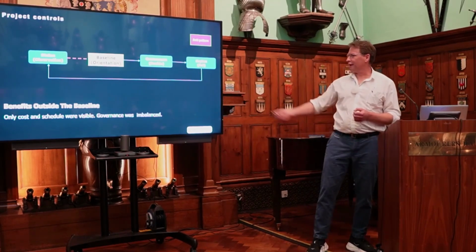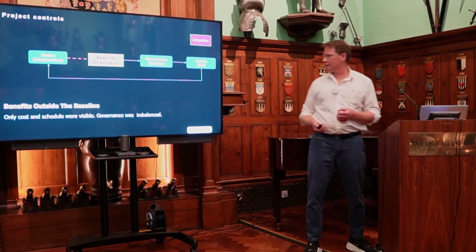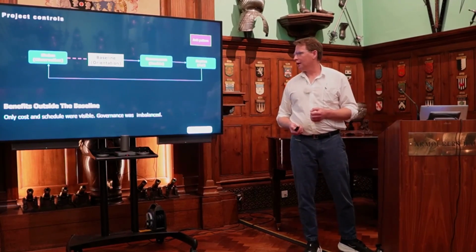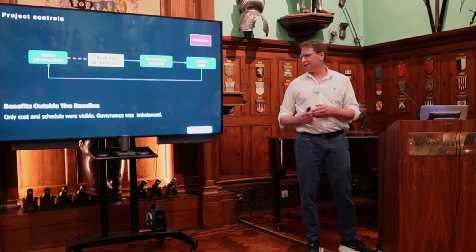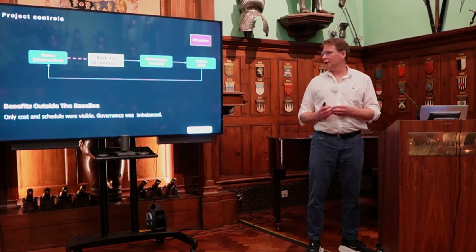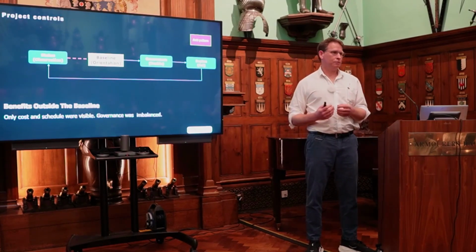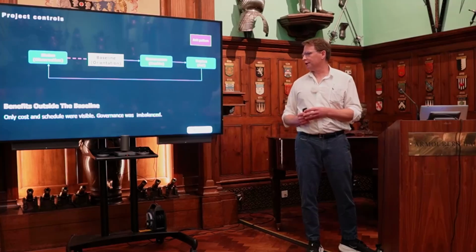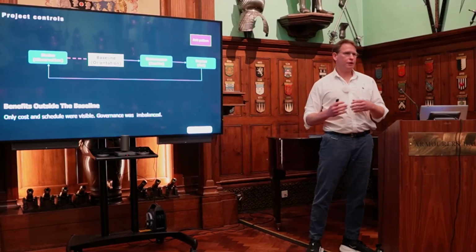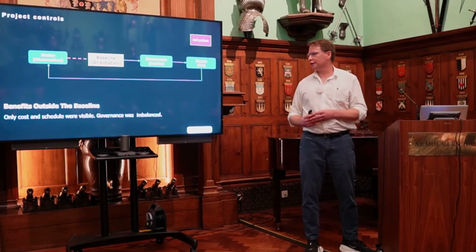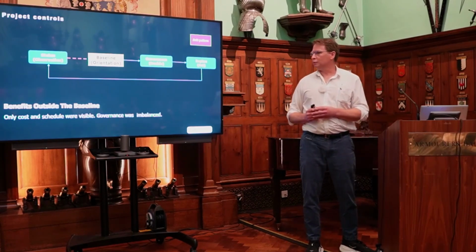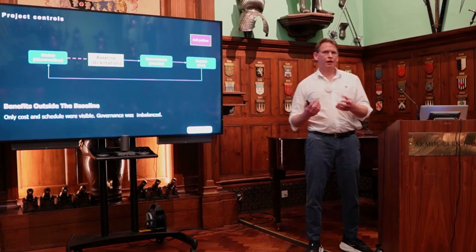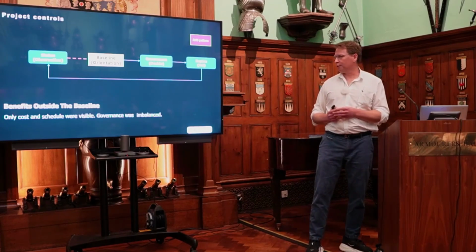So, aviation, UK major airline. So again, orientation. On this one, the baseline was very good, also very clear. Cost and schedule and risk well represented within that. But benefits, even though there were large programs, there weren't just projects, obviously, there were large programs. So the benefits of those programs were not included in that baseline that was getting updated every month or so.